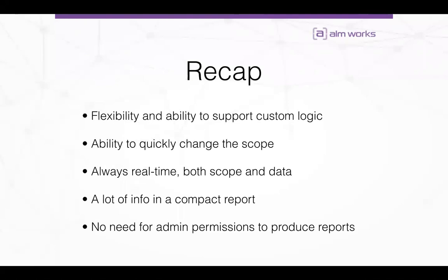So to recap, what structure offers is a lot of flexibility. Using formulas, you can really create metrics that may use your Jira data in some less conventional way. So maybe you're using estimates on different levels for different purposes, and Jira doesn't always allow you to report that way. Like maybe your epic estimates are just preliminary estimates and you don't want to count them when you're doing the report. So whatever logic you have in there, you can incorporate it in formulas.